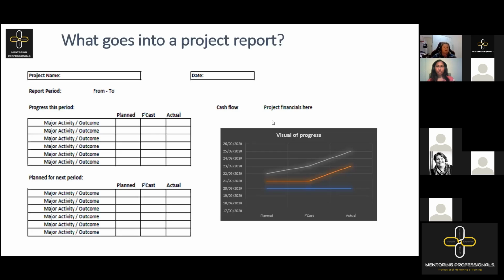So whenever we have these kind of issues where we haven't actually progressed, then again, we should have some sort of log that goes with that, either in terms of our RAID log, or more specifically, progress that we have planned to do, but we haven't actually progressed at all. That would be something that would go into the issue register. What is the problem? Why have we not progressed?